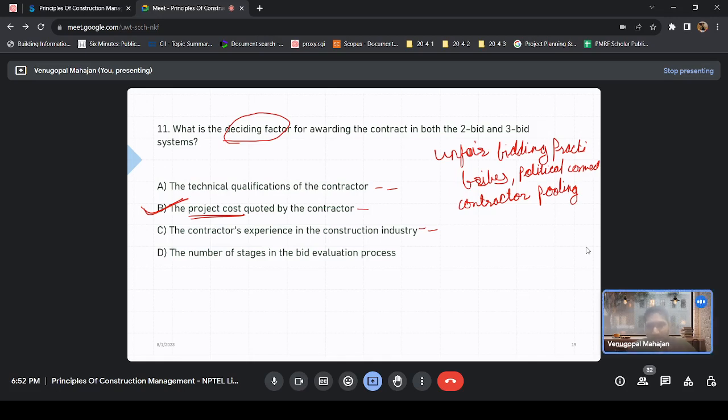Yes, absolutely, this happens. Even I was on a site once. It was a 1,000 crore project. Initially it was awarded to someone well connected, and as you know, the first task in construction is usually the excavation. That party could only complete till excavation, not even complete. They did some excavation, got some amount, and went out of the project, and it was handed over to another big company to complete it finally. So unfair practices also bring a lot of losses to the public exchequer.